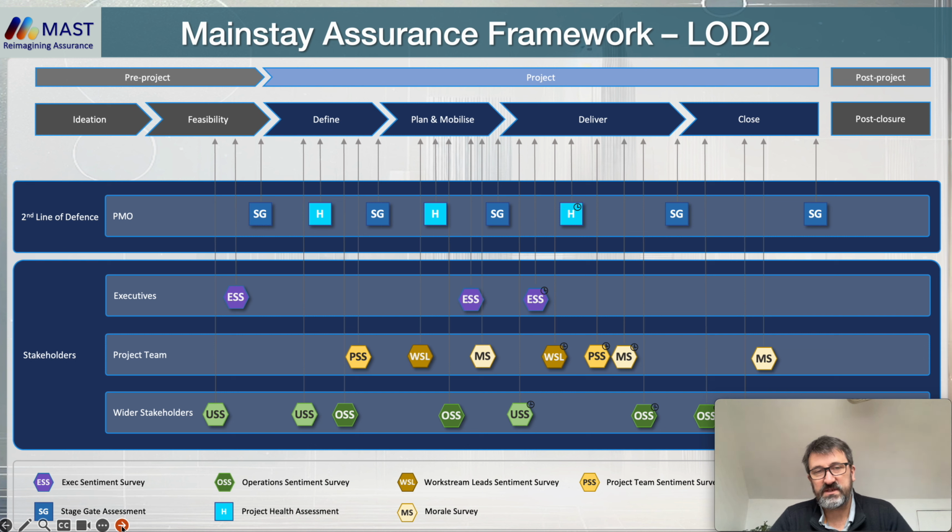They follow the same kind of pattern: you carry out your formal stage gate review in the tool. So you've got a clear history of what was agreed and what the key risks are. And then you follow the same pattern in terms of the health checks, which are done at regular stages. So this is usually the PMO and the project manager sitting down comparing side by side the self-assessment that the project manager has done, and it's really great to be able to understand if there are any capability issues with the project manager or even behavioural issues.